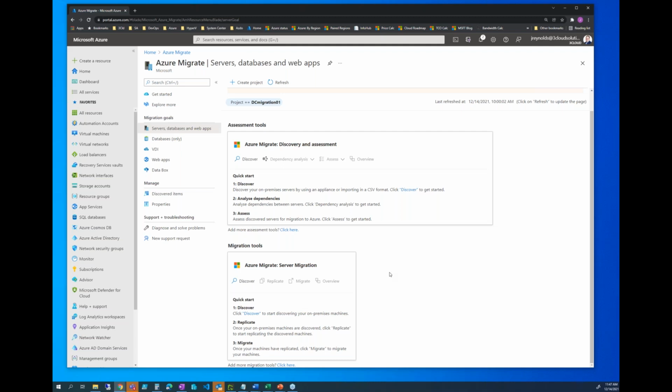So we've seen it all on this end. It's always an experience working through migration, but getting through those first couple workloads as you break them out into a wave migration, grouped together, if you want to call them migration groups, really affords the opportunity for us to move in a controlled manner instead of having to do everything in a big bang.